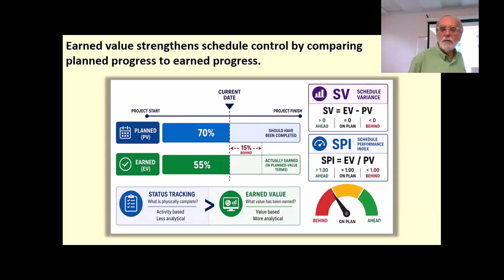So say we decide that we're going to track progress based on hours, and somebody's been working on a 100-hour activity. They've logged 25 hours on it. We might want to assume that they're 25% complete. They may not really be, but that may be an assumption we've decided to live with in our planning. So all these things, as I mentioned, are connected.